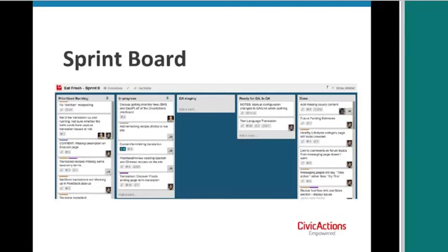There's probably other stuff that's not as difficult and maybe doesn't need wireframing, especially if you're using Drupal. There's some out-of-the-box stuff. So developers would be working on that out-of-the-box stuff. And then when the UX is done, it would go into in development. So I'd be splitting this in progress column into in UX and in development, right? And then you could just take it to QA and done.